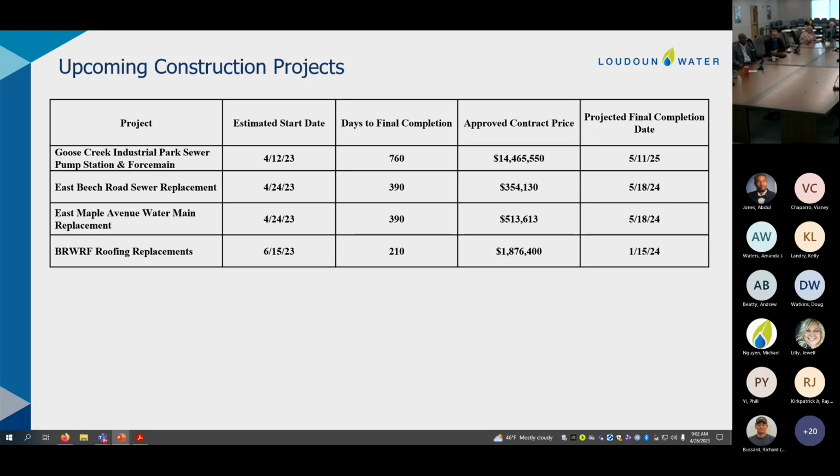Mr. Salt, back to your question, at the expansion project we have 2 Hazen inspectors and 2 Loudoun Water inspectors, and they share the work. The work areas are divided up because we have 8, 10 work areas. It's divided up based on the size of the work area and the current load of the inspector to cover all those areas on a daily basis.